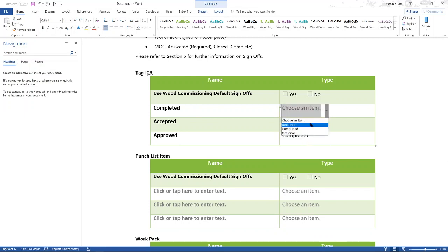So that means that you have to sign off completed by, you have to sign off accepted by, and then you can sign off approved by. And only at that point is it counted as done. You get the credit for doing the work. It will show up on the graph as completed. So that's the final one.